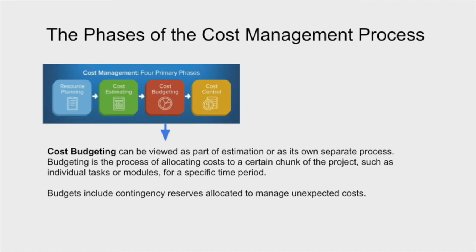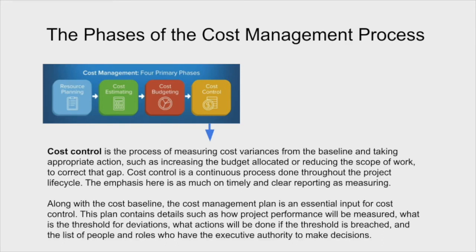Budgets usually include some sort of a contingency reserve, which is an allocated amount of funds for potential overages or change orders or these sorts of things. So it normally comes in as a percentage of the total cost of the project. The final stage is different than all the rest because what the first three did was really the planning stage.